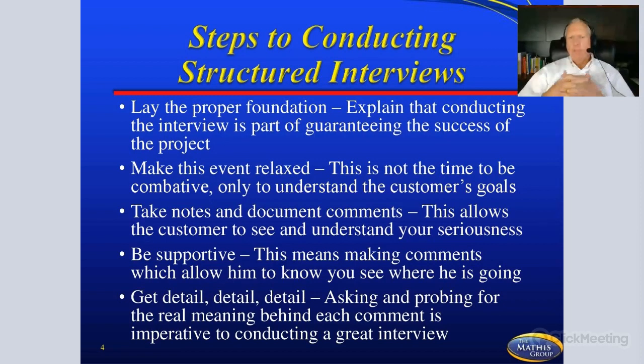Now, here are some steps in conducting a structured interview. Lay the proper foundation, explain that conducting the interview is part of guaranteeing success, and make the event as relaxed as possible. You're going to want to take some notes and make comments back and forth because you're facilitating this with that customer. You're going to be supportive. You're going to be nodding your head. All of the supportive types of behaviors are going to be there because you want this to be as relaxed as possible. But you want to get detail. That means you're asking those probing questions because you don't want to miss something here.